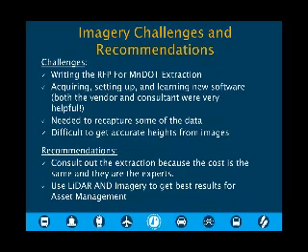The images were high resolution, taken every 12.5 feet, but there were just some hardships with using image data. Also, what we found is that the cost to do extraction was roughly the same cost as having it consulted out. So one of the recommendations I have here is to rely on the experts. In the future, on the project we have going on now, we're having the extraction done by a consultant.